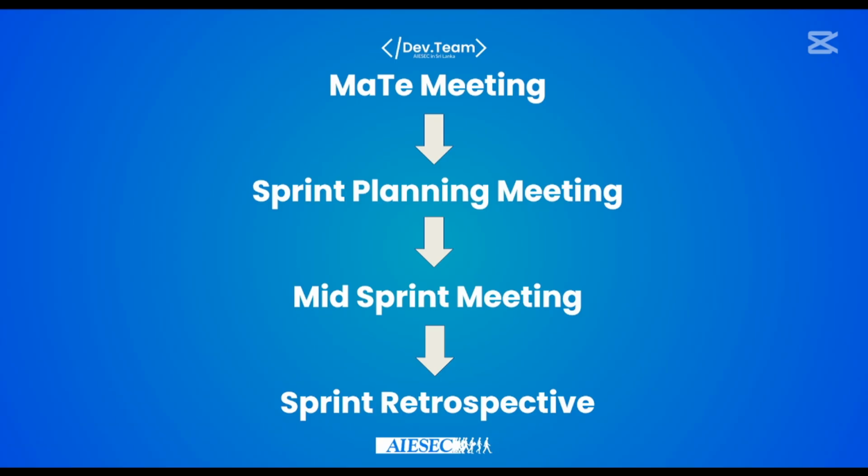These are the essential things. And other than these things, there can be more other meetings, right? So first thing is the sprint starts with a meeting with the management team. Only the management team will join that. In that meeting, I'll give you all the requirements for the upcoming sprint, right? This will happen at the end of a sprint, right?